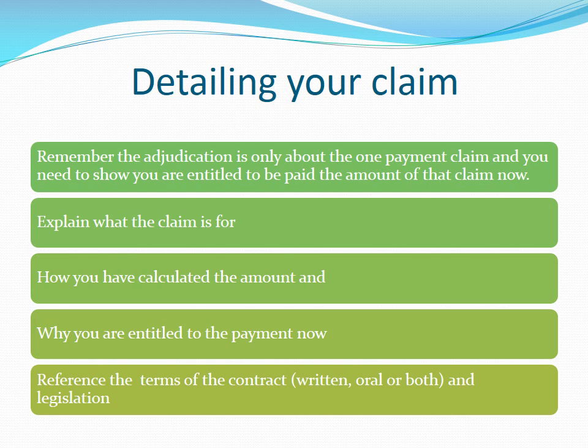Remember, the adjudication is only about the one payment claim, and you need to show you are entitled to be paid the amount of that claim. It is important you explain what the claim is for and how you have calculated the amount, and why you are entitled to the payment now. You need to reference the terms of the contract and legislation.